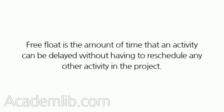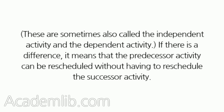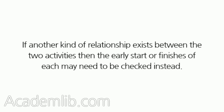Free float is the amount of time that an activity can be delayed without having to reschedule any other activity in the project. Free float is determined by comparing the early finish, if the relationship between the activities is a finish-to-start relationship, of the predecessor activity with the early start of the successor activity. These are sometimes also called the independent activity and the dependent activity. If there is a difference, it means that the predecessor activity can be rescheduled without having to reschedule the successor activity. If another kind of relationship exists between the two activities, then the early start or finishes of each may need to be checked instead.